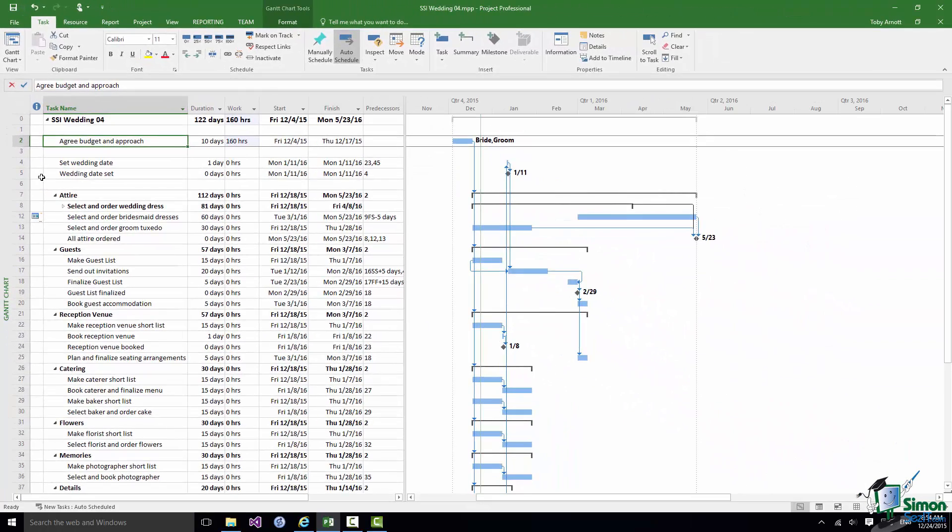When we do that Project 2016 is quite happy. The warning's gone away. We've got our 160 hours of work. We've still got a ten day task and the bride and groom are assigned to that task.